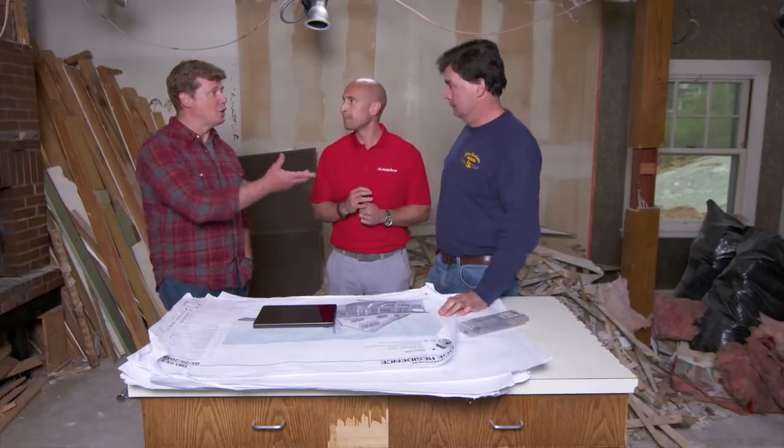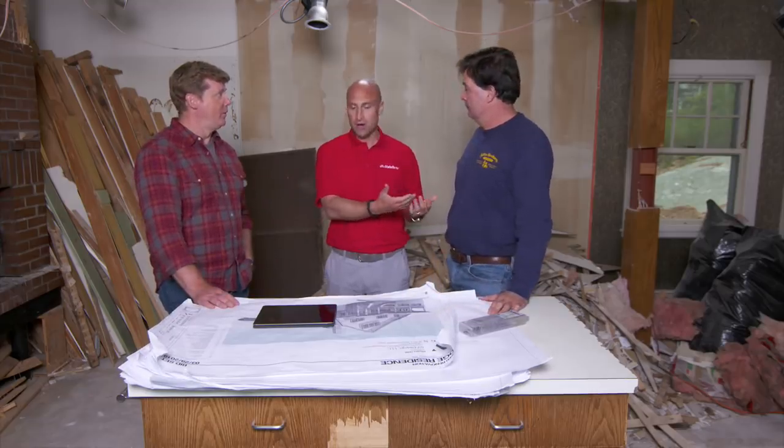So I could ask you then for your sub certificates. Yeah, as a good practice, every general contractor should be keeping a list of all of the subs that they use, with certificates of insurance that name them. If the policy cancels, like we said earlier, you get that notification that they've canceled. If they switch companies, you want to make sure that you're notified and listed on the new company.